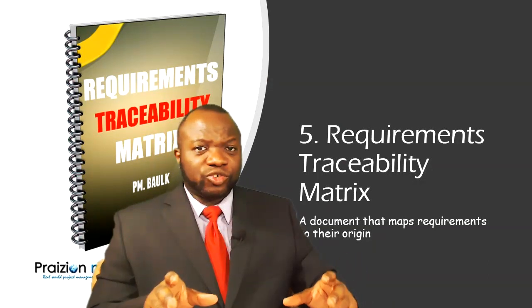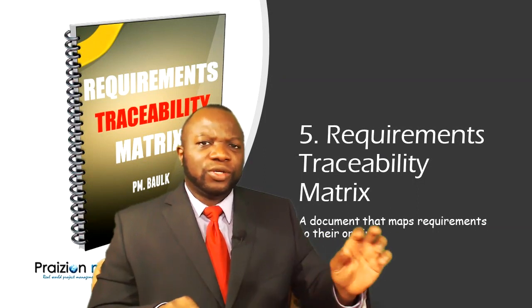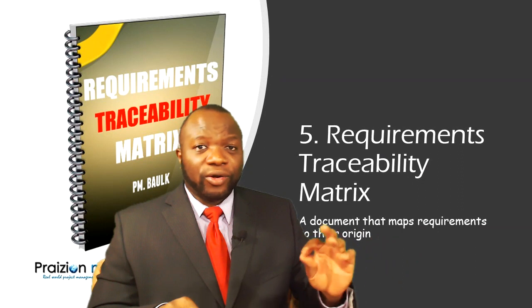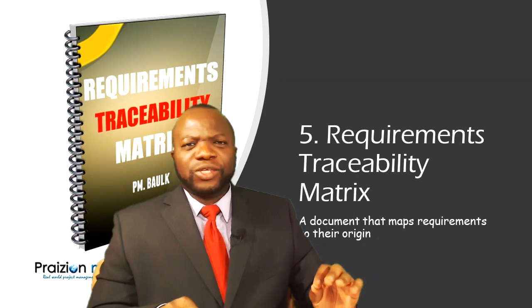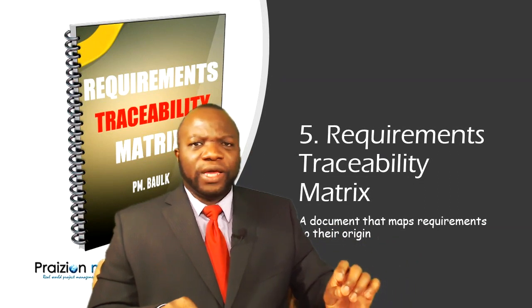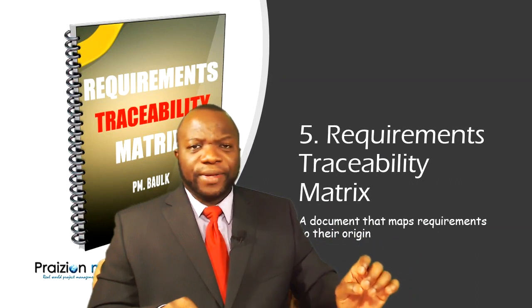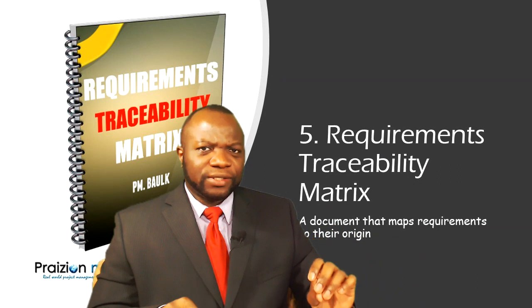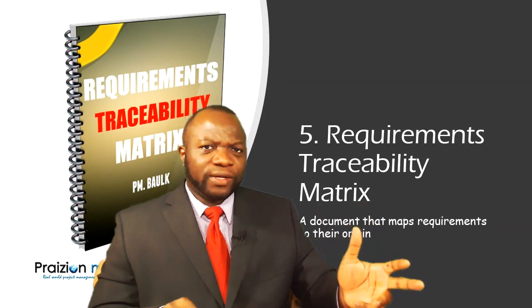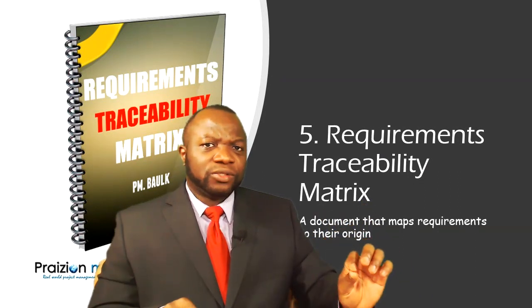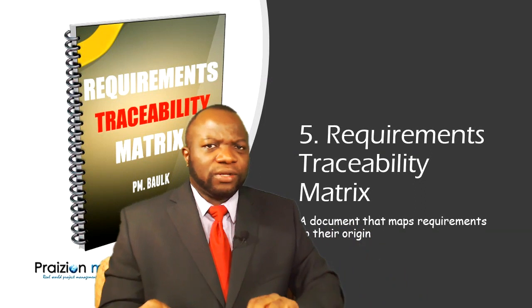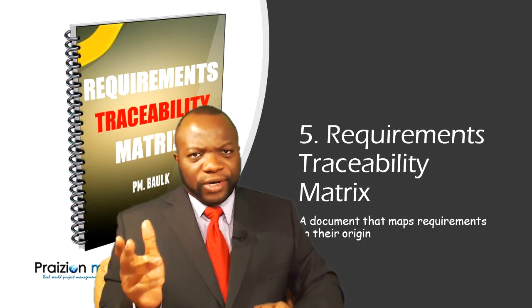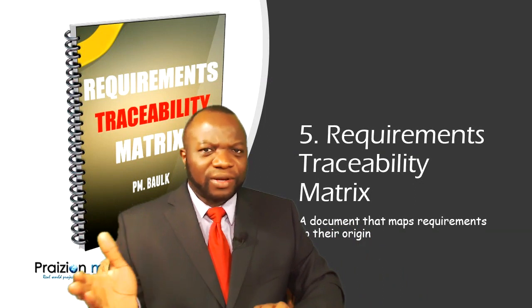It could also be used to track, as I used it, requirement to use case, priceless, requirement to test script, even better. Because as we began to test the software, we were able to link each requester of a requirement to that specific test. We got them to test their requirements, and we had another field that tracked the requester to a signature, electronic or otherwise, to signify that they had signed off on those deliverables. Awesome tool. Well, output to be PMBOK compliant.